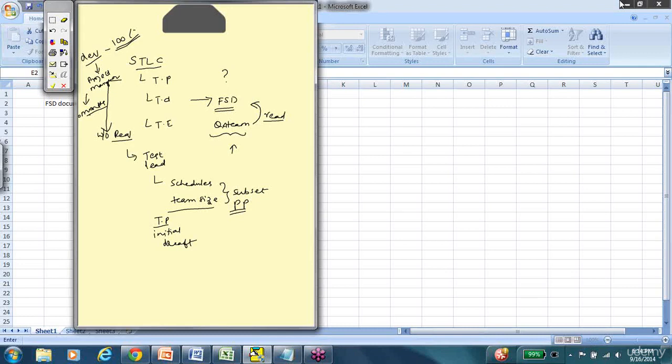So when you agree that I will deliver the project by the end of December, you're anticipating QA to come sometime in November or before the deploy phase begins. That kind of timeline that has already been established in the project plan is something that we pick up from the project plan in the initial stage. But as you said, this schedule is subject to change, the team size is subject to change, because we don't know the extent of work we are working with. So that is why the FSD is very important to actually come up with a concrete test plan.